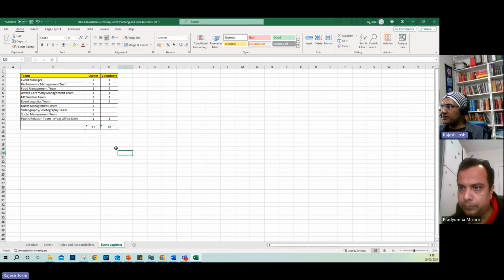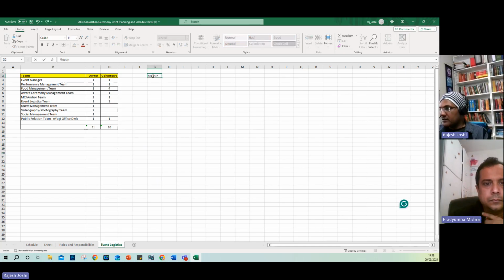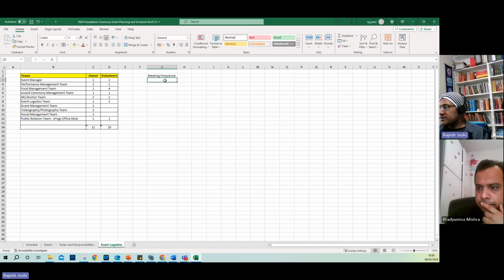There will be a rehearsal as well. So meeting frequency, we'll just write here. We are at T minus 6 weeks, right? So weekly from T minus 6 to T minus 3 weeks.